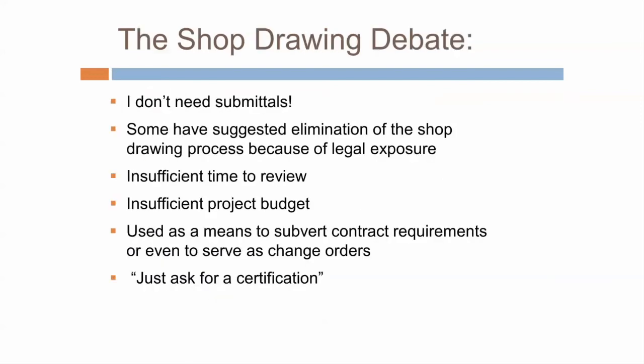For years there's always been a concern about the liability of shop drawings. Papers have been written suggesting maybe we should do jobs without submittals — some have actually put this forward. The concerns include insufficient time to review in today's modern pace, insufficient project budget, and recognizing that shop drawings are regrettably often used as a means to subvert contract requirements or serve up potential change orders. The suggestion was: why not just ask for a certification from the contractor saying everything meets the contract requirements, without needing to see any paper?